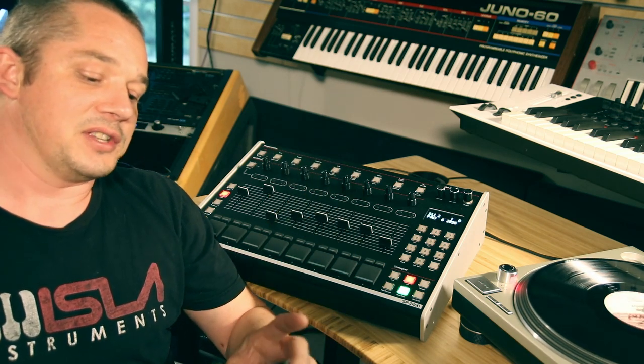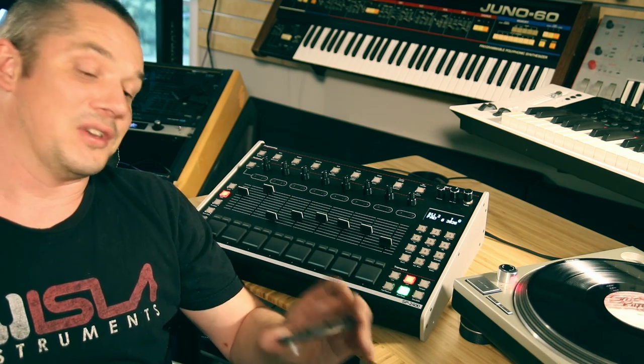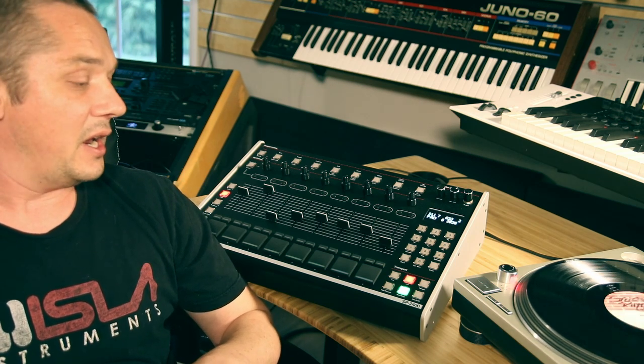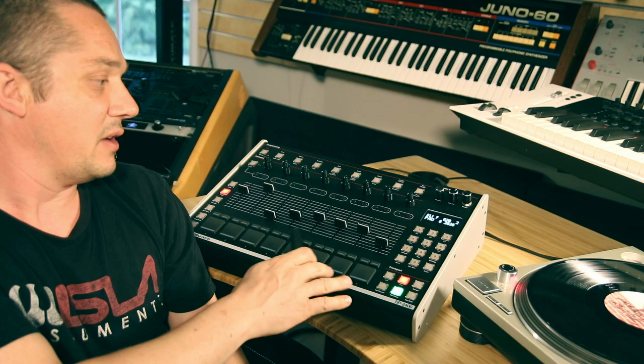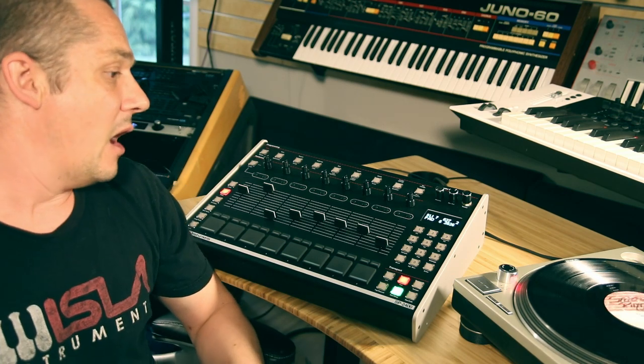It was my understanding that these were going to be ready to ship straight to my contract manufacturer, and alas they're not. Because of the volumes that I'm ordering these parts in, there's a 3-week lead time. So unfortunately it holds back the production of the user interface panel a little bit. Now the enclosure and the silicon parts and the knobs and everything else will still start going into production from Monday, which is when China come back from their New Year celebrations.